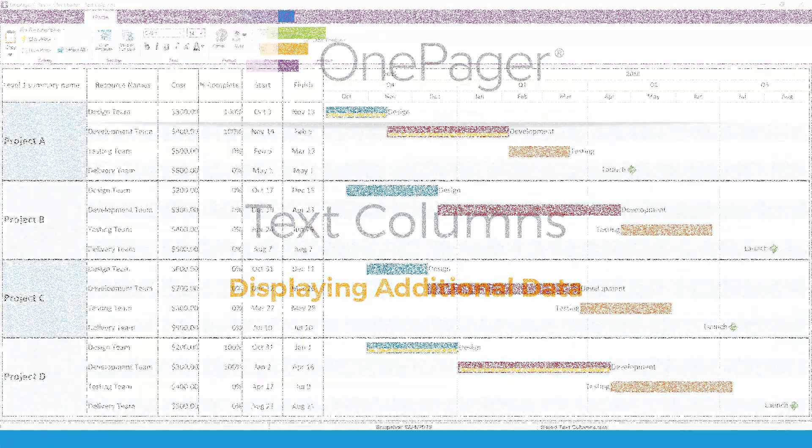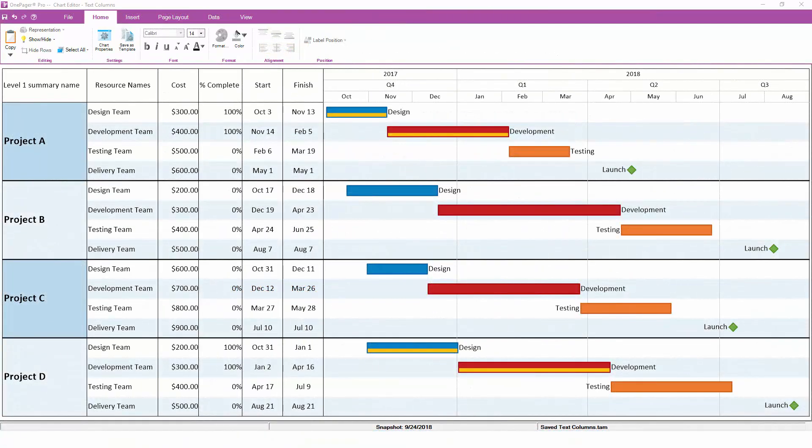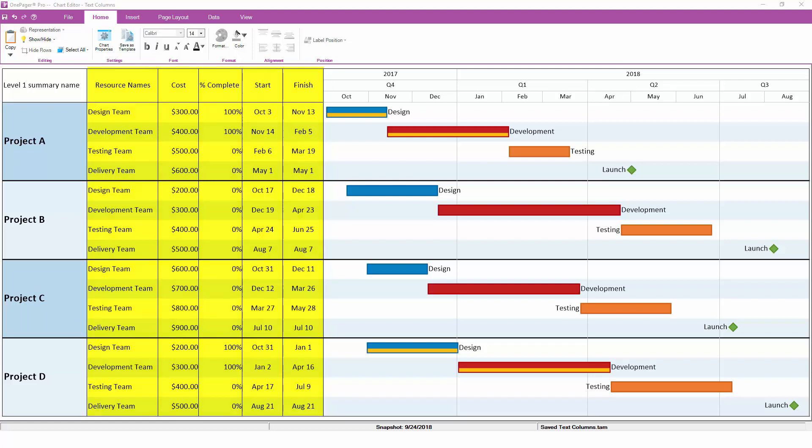Earlier in this video, we turned on a text column to help label some of the timelines that we created. Text columns are a useful way to incorporate additional data into your chart that might not fit cleanly in other places. OnePager supports up to five custom text columns, which can be mapped to any field from your project schedule. Just like swimlanes, text columns are numbered one to five, from left to right, and will always sit to the right of your swimlanes.